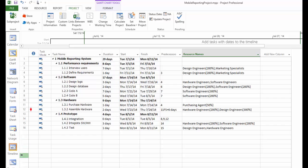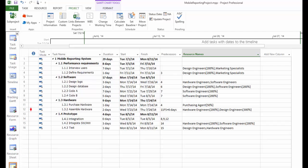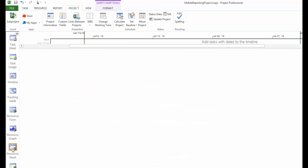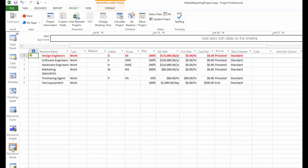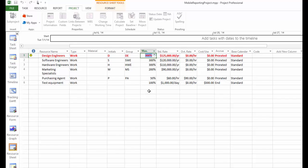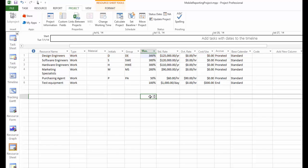In the project file, you can go to the resource sheet view and increase the design engineers from 200% to 300%, which of course means additional cost to the project. But this will remove the resource over-allocation problem for design engineers.